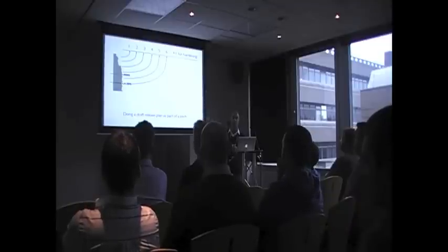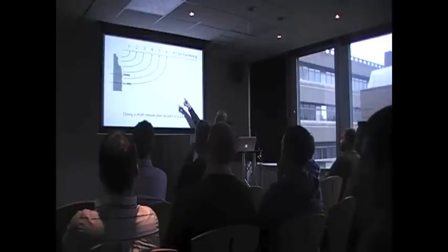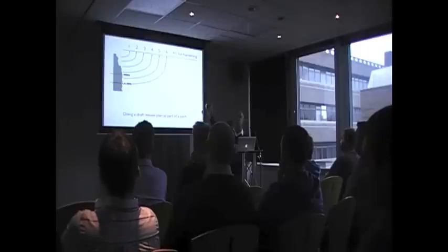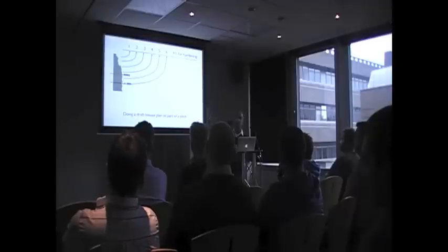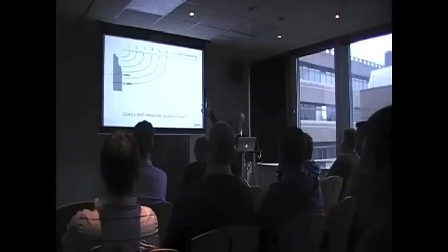But with the conversation that we have with the client, we can go, if all of those above the first line are really simple, and we do it in 2 weeks, for instance, we know that we can take some things off of that extra 40%, and that'll make the client very happy. Obviously, we only say we're going to do the first one, and then that gives us, so if they suddenly throw some massive complexity into the first step, we've got 40% buffer that's kind of protected us and protected the client. They know roughly what we said we were going to deliver.